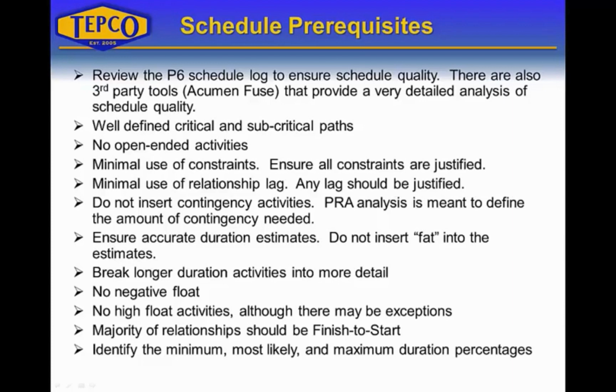Don't use too many constraints. Ensure all constraints are justified. Constraints bind up the schedule. Don't allow it to flex or breathe like it should. Constraints should always have some sort of justification behind them. Typically your start milestone and your finish milestone would have constraints on it.